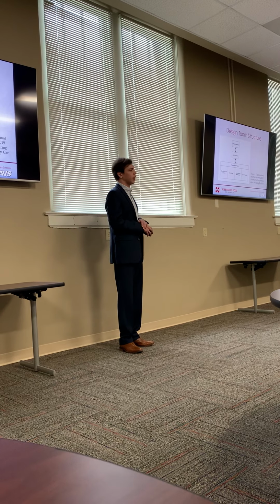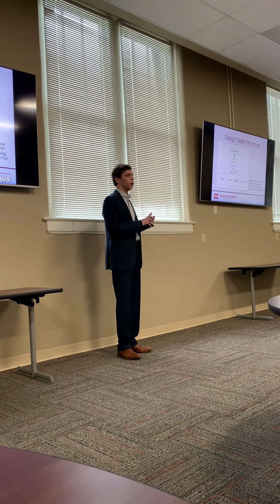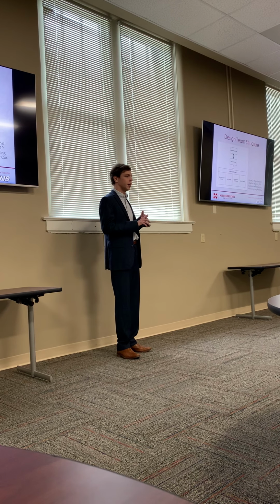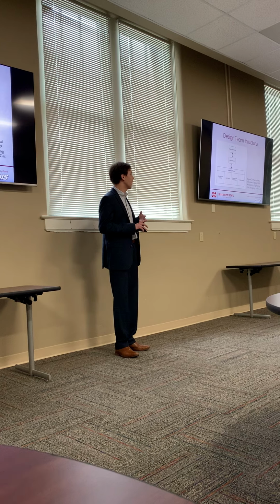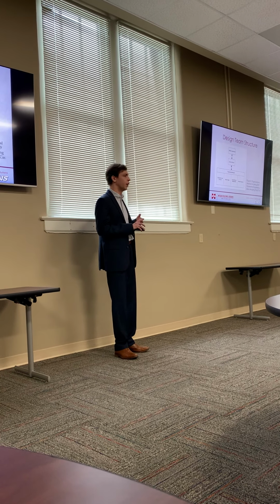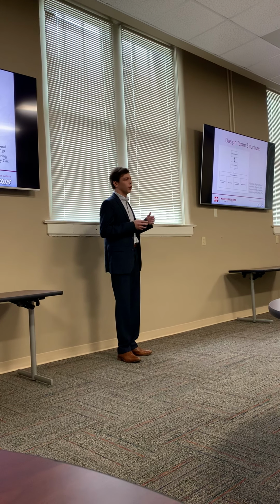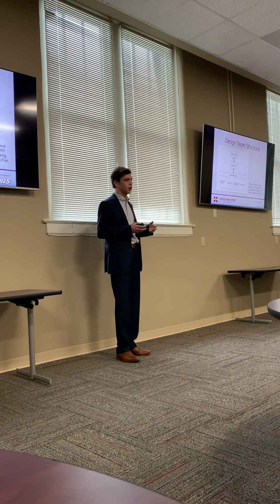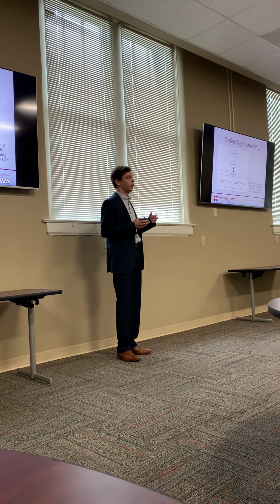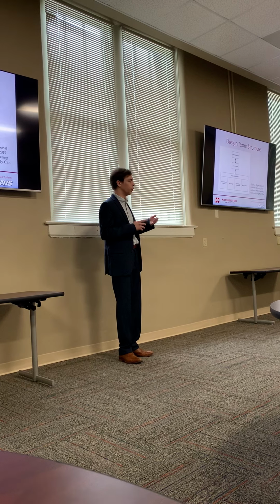The automotive engineering class was structured into 4 different design sub-teams for electronics, body design, assembly, and features, and also an engineering management team of 3 different students. The engineering managers worked to oversee the design sub-teams, help coordinate communication, and also work with the class professor on higher level decisions that needed approval.